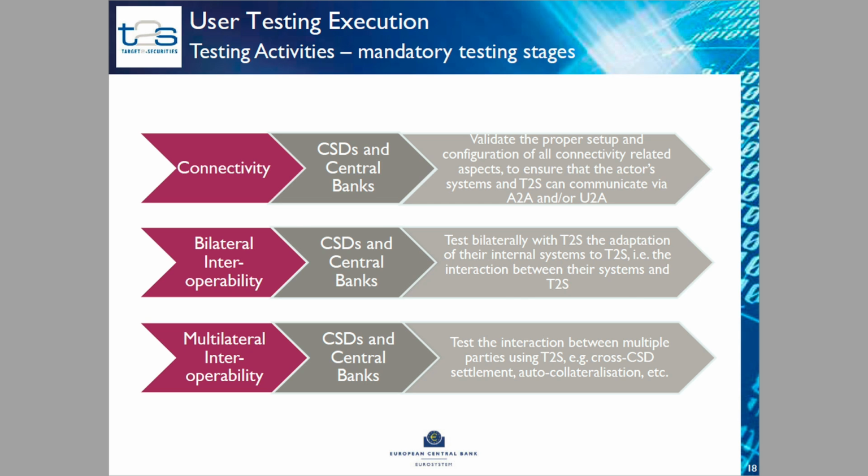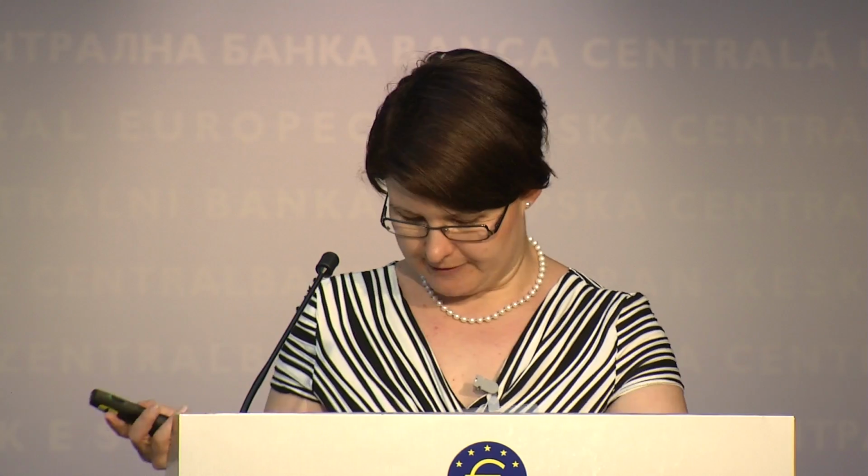The next stage, which is the multilateral interoperability testing stage, is the stage where CSDs and central banks will start testing under their migration wave configuration. So this is the first time when they start testing the cross-CSD settlement. They do it exactly end-to-end with their central bank. They can see that everything moves correctly, it's smooth, configuration is correct, and with this testing stage, in principle, the CSD or central bank should achieve the feeling, at least, and the confidence that now it's ready to open the system for the CSD participants and payment banks to start testing on T2S.